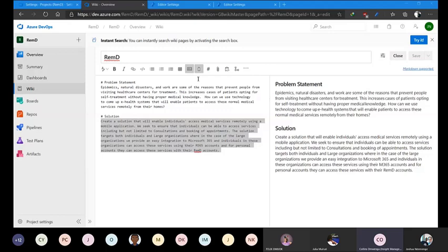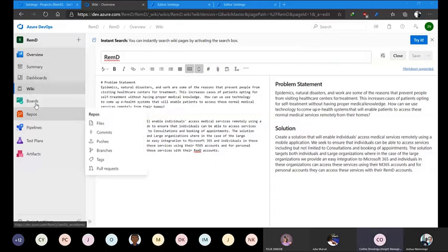But as you do that, probably something we can start working on. Just from your own perspectives, what do you think would be a good feature to start with? From an epics perspective, we are thinking of a mobile application. A mobile application requires the mobile app itself and then a backend service. So let's have three epics: the mobile app as an epic, the backend service as an epic, and data management as an epic. So you can go to boards,